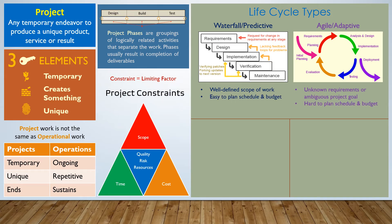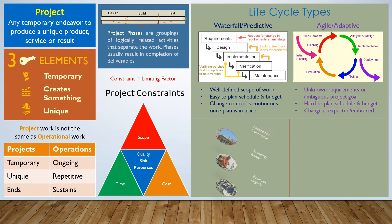Waterfall projects are easy to plan for schedule and budget, but it's hard in an agile or adaptive project to plan those same things because you have unknown requirements. Change control is continuous in a waterfall project — you have a plan and just make sure you stay on it. But in an agile project, change is actually expected because we don't have all the requirements up front, so we have to embrace that and have processes in place to manage it.